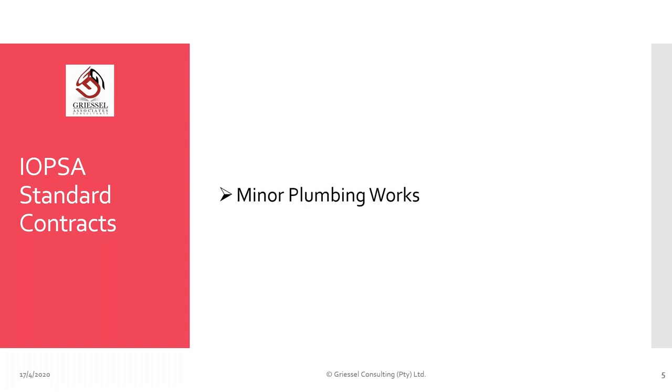I think one of the greater risks that you have on any contract is that you must complete in time so that you avoid penalties if there are penalties in the contract. You will carry the risk of protection of the works and of the materials until practical completion is achieved. You have the risk to make sure that the materials are on site at the right time, and you will have to carry the risk of any cost increases that might happen during the course of the work.